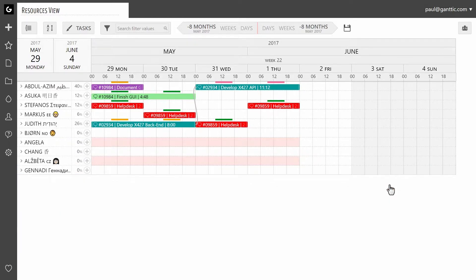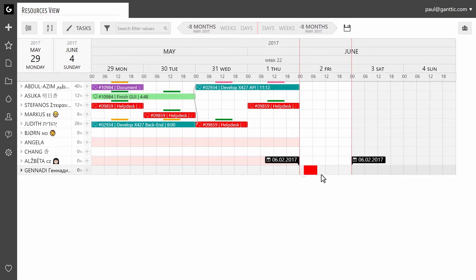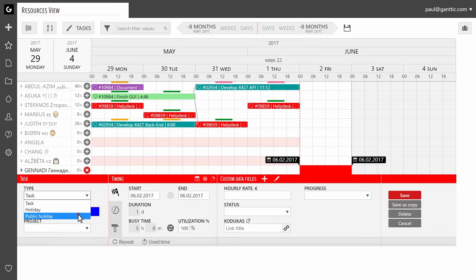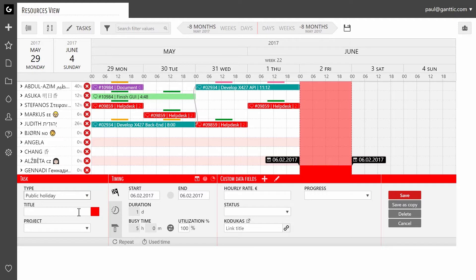To create a public holiday that applies to all of your resources, create a task and choose public holiday from the task type menu. Name it and click on save.